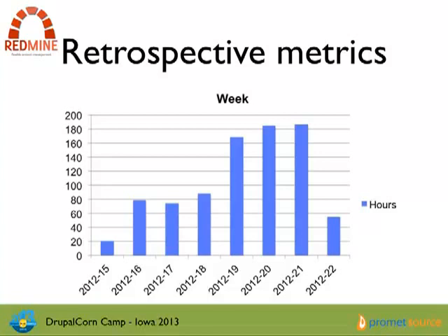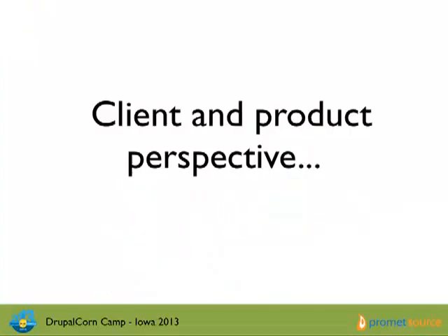Part of the thing is, if you're not doing those and you're not tracking any of this information, you don't have some of your valuable data to go back and review. So the key is, get it into your tool, start tracking some information, start pulling it out, start using that as part of your retrospectives, and start building up some of that historical, trend information. Then you get an idea of what may be happening there.